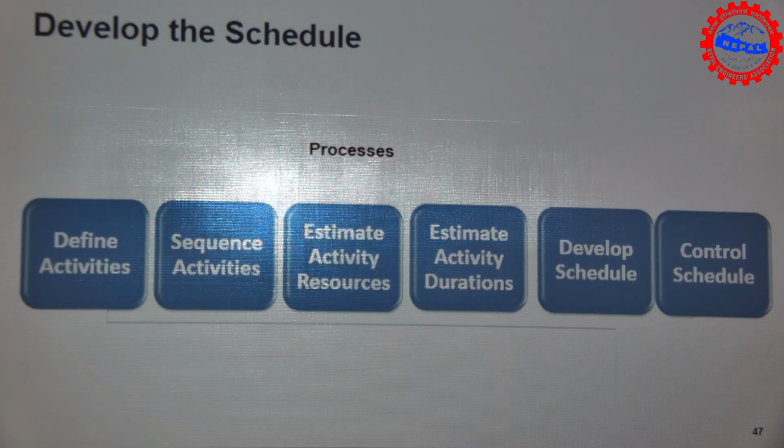How do you know which sequence to start, which will be the next one? Finish to start or start to start? Certain activities you can start together, overlapping, and you can save time on the whole project duration. Certain activities you need to finish to start, or maybe in between.